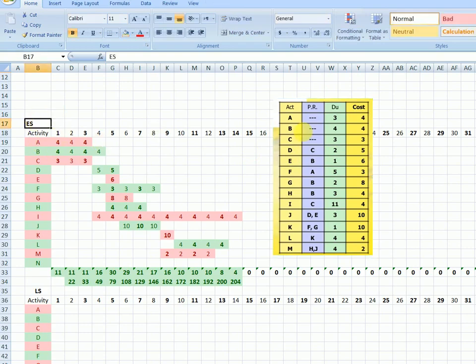Look at this. Now A depends on what? Sorry, F depends upon A. There's a link between them. So where is F now? Here. So if I move A by 1 day, even F will change. So I can say free slack for this one, we're going to write here FS. We're going to prove it later, if you have time to prove it. 0.